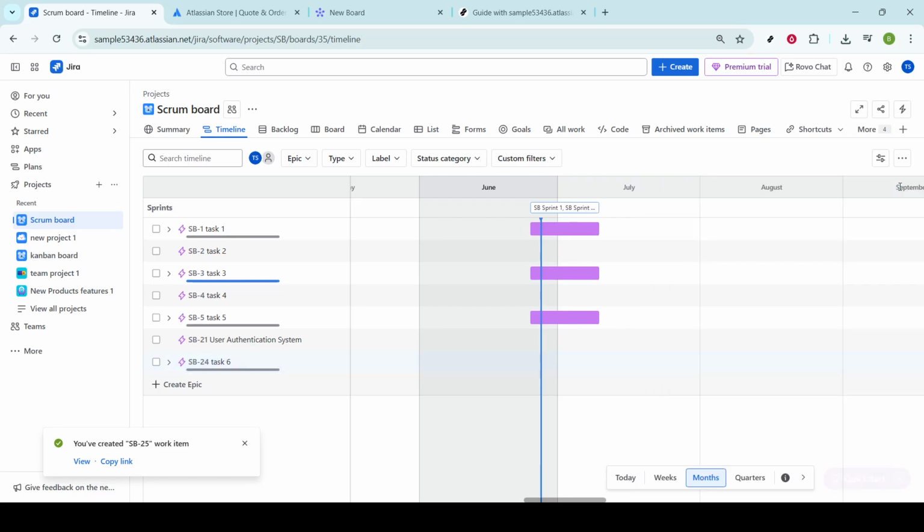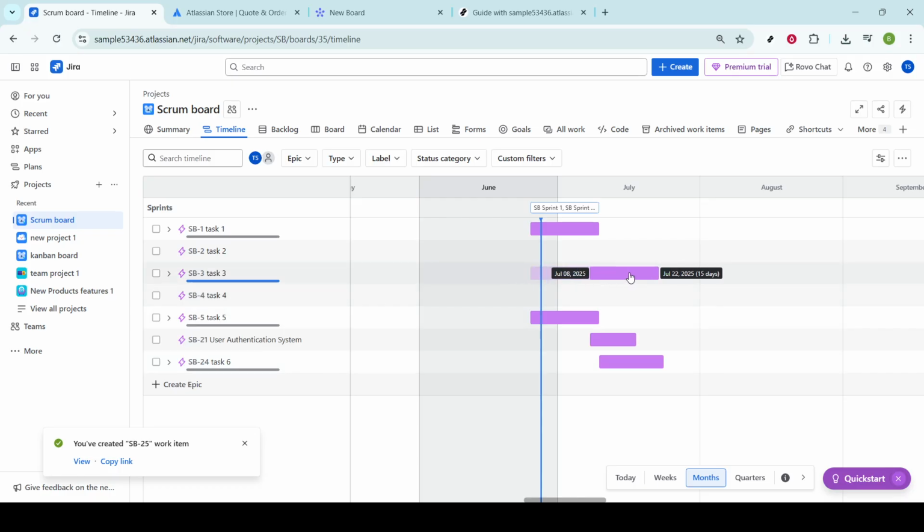Now, let's look at managing the timing of your issues. Hover your mouse over the right side of any issue below the month column. You'll see a start date and end date appear. By clicking on these, you can directly assign them to the timeline. After setting them, you have the option to refine or adjust these dates further. Simply drag the edges to modify the task's duration or timing within the project timeline. This adaptability is key, allowing you to accommodate any real-time adjustments your project might demand, and helping you keep everything smoothly on track.